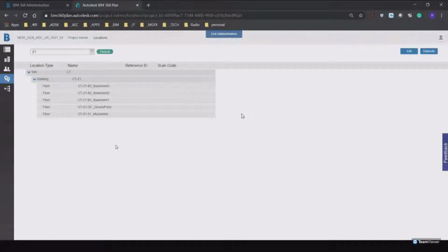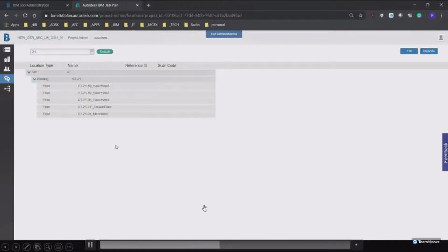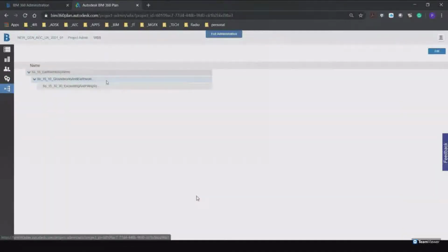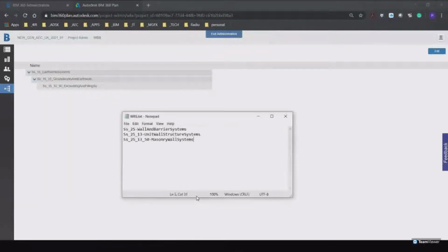But specifically, we would like to say where we are busy within a project, then we will refer to a location. So per site, building, and floor, maybe a room after that. And then we've got the workbook structure. So I've borrowed here from the British systems,